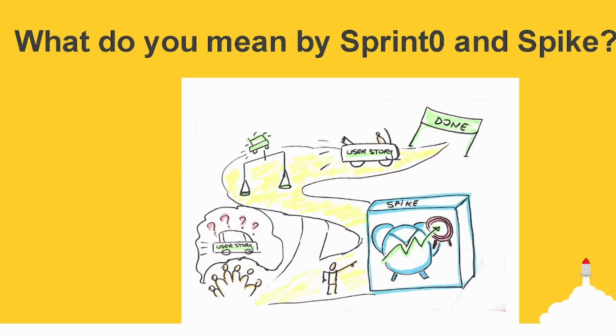What do you mean by sprint zero and spike? The modest amount of effort put in to estimate a rough skeleton of the product backlog is referred to as sprint zero. It also contains information on calculating product release dates. Sprint zero is necessary for the following tasks: creating a skeleton for the project as well as research spikes, maintaining a minimalist design, creating a few stories completely, being lightweight, and having a low velocity.